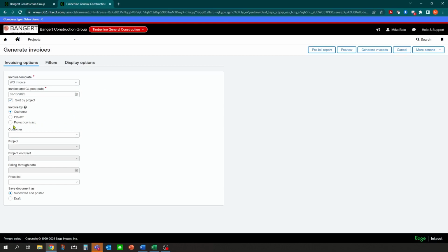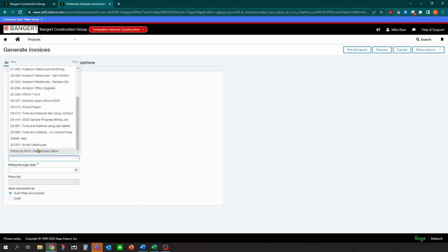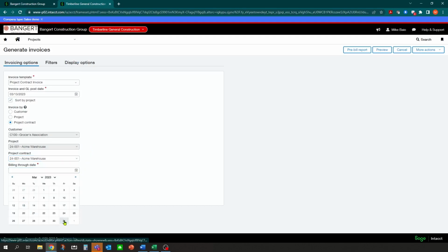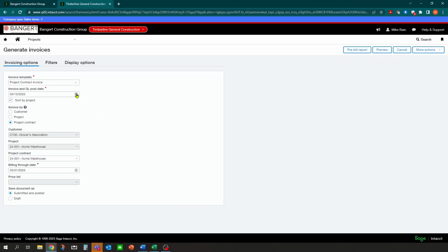And what we're going to do here is we're going to switch over to what's called project contracts. We're going to pick our contract. So there's the 24001 that we imported in prior. Let's say we're billing through March 31st, and our invoice date's going to be March 31st as well. From here, it's going to select the proper form that we want to use. So this would be our progress billing form.